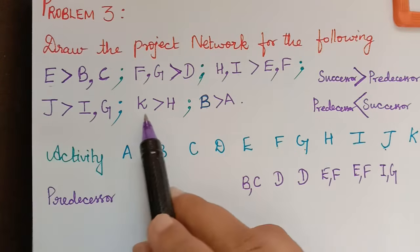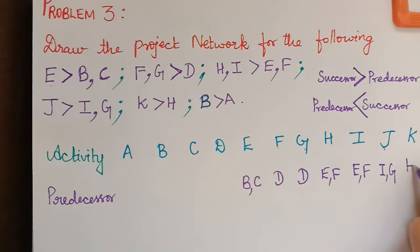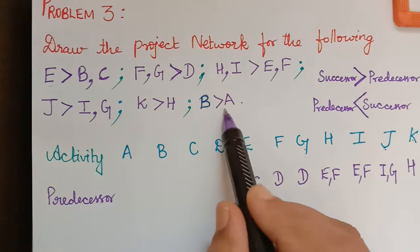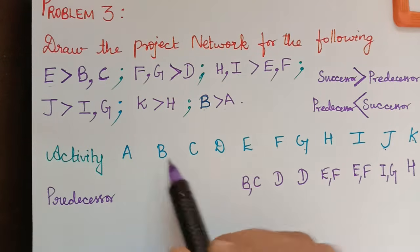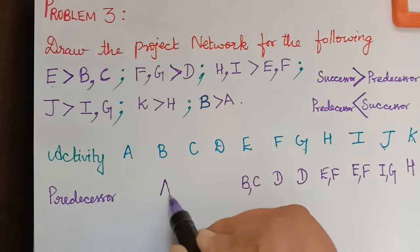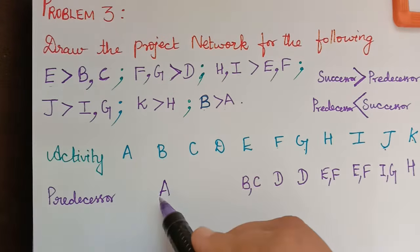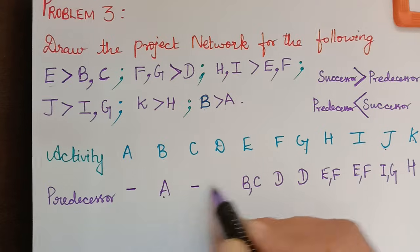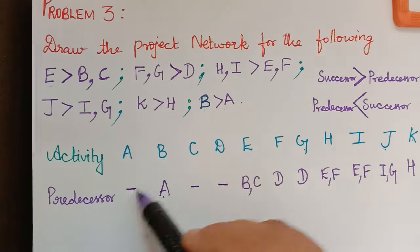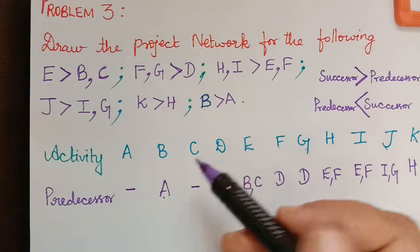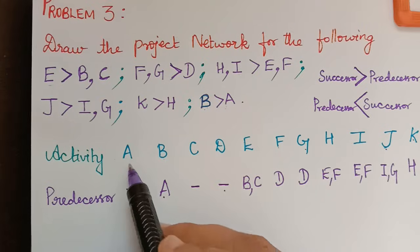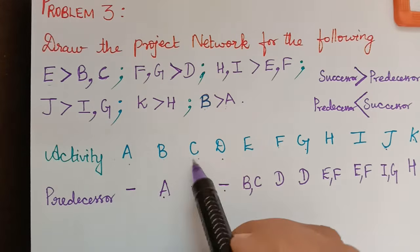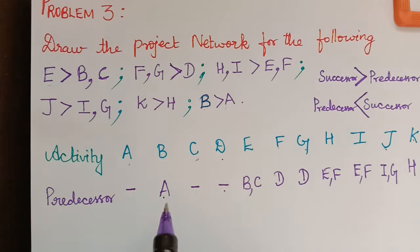H is the predecessor of K, and A is the predecessor for activity B. The remaining activities — A, C, and D — are hyphenated, meaning they do not have a predecessor. These three will be the starting activities and will start simultaneously.